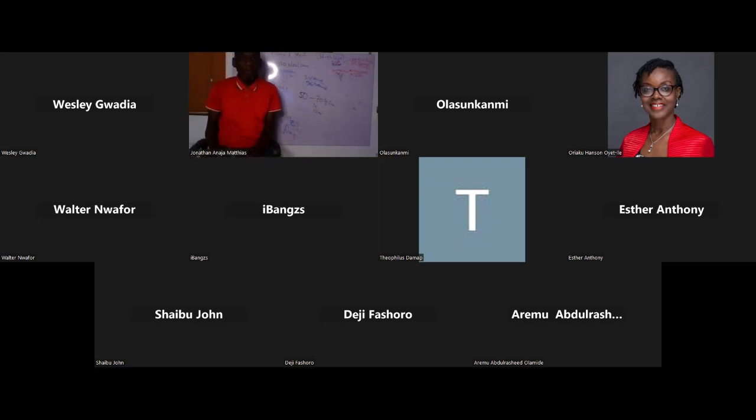From experience, when I'm initiating the project, this breaking down into bottom-up estimation is during the planning stage. Yesterday, I took us through the project life cycle. You do these details during planning. By then, you have been commissioned, authorized, you have signed the MOU, you have been mobilized to site. You have resources. You won't run the risk of wasting one month to do something, and then the client will say it's above budget.